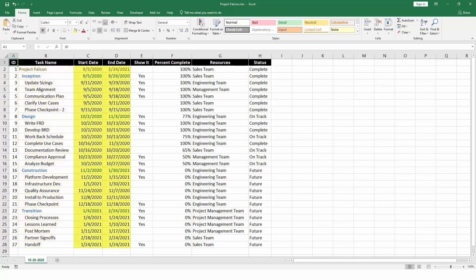Next to each task, specify a start and a finish date. We also recommend having a unique ID. Think of this as a fingerprint or a serial number for each task in your project plan. Each task's ID should be unique and the same task should always have the same ID even as you continue to update your spreadsheet and your OnePager chart. You don't need to overthink the unique ID too much. Here, each task is simply numbered sequentially and that will work just fine.